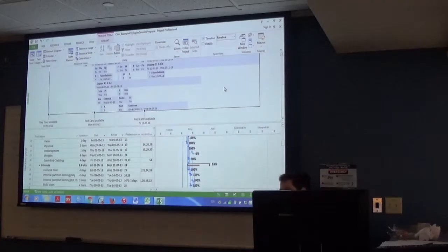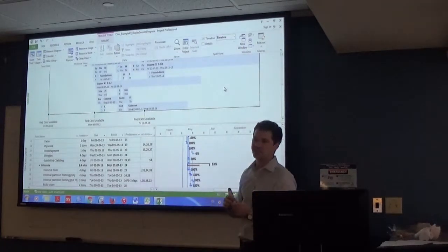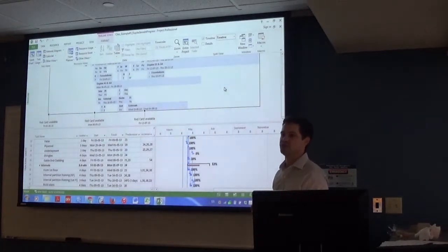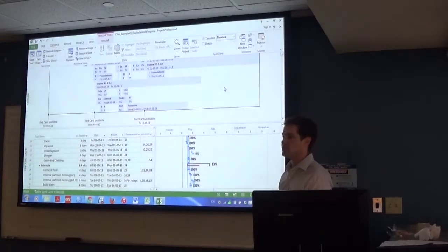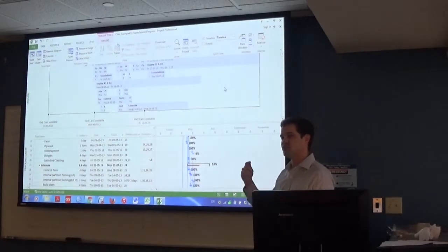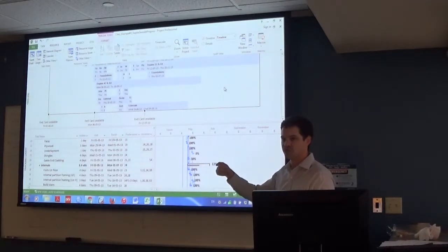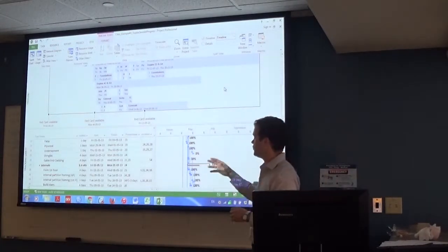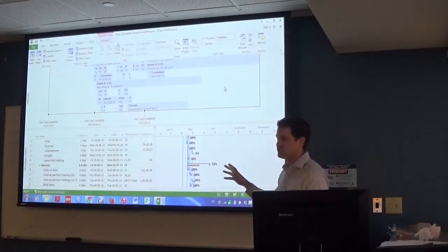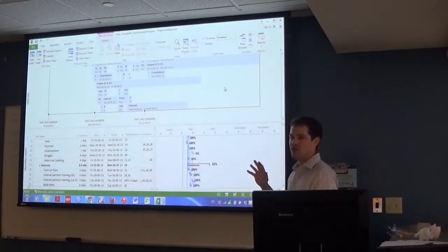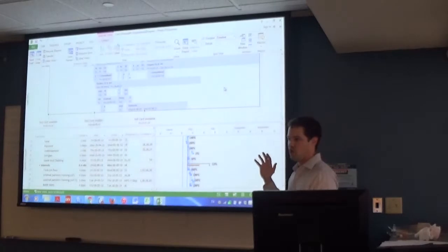What we're looking at here is we're building a certain number of duplexes in series. What he was trying to do with this particular project is look at what series of duplexes we need to build to get the economies of scale to have them efficiently produced. He said, okay, well 6 is a good start. I can't efficiently build one duplex at a time.